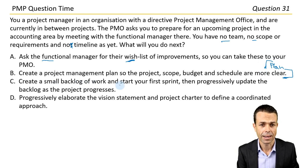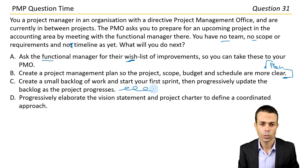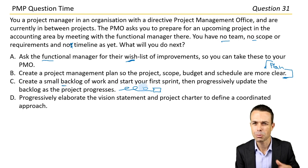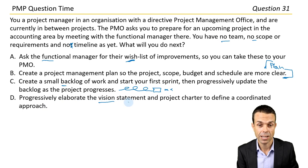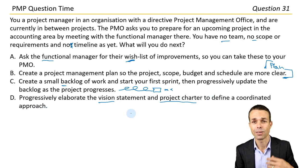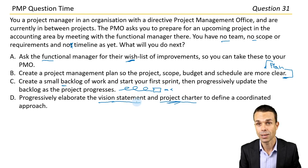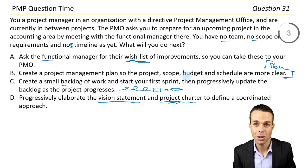Option C: Create a small backlog of work and start your first sprint, then progressively update the backlog as the project progresses. That's an agile or iterative approach, but we still may need to do the planning — why are we doing this project in the first place? I think we need something bigger: a vision, a direction. Option D: Progressively elaborate the vision statement and project charter to kick off the project and define a coordinated approach. Remember, we're in the very early days — the project hasn't even been kicked off. To kick off a project we do need a project charter, or in an agile environment a vision statement, to find out where we're going. Then we can do all the other things. Let's go with answer D.